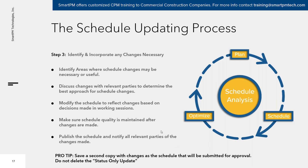At that point, save a second copy with your changes — call that your submission for approval, your schedule update inclusive of changes. Always put the date in the title of the schedule file. Now you've got two schedules: one 'status only' update for that date, and one 'schedule update' that includes your changes.